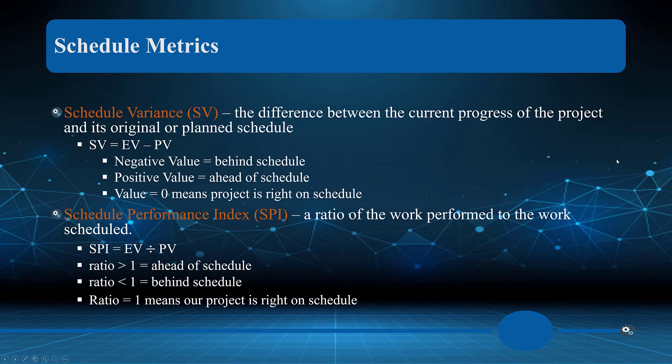I want to caution you on the next two metrics — the schedule variance and schedule performance index. The reason is that what we're measuring here is time, but we're using money to reference or assess time. Be careful with these, although they are valuable.